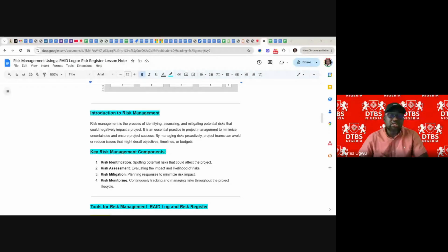As you're having contingency for budget, you're equally having contingency for timeline. If you have 6 months to deliver a project, you can plan the project around 4 months, so you build a very tight corner. But if you slip from 4 months, you fall back on 5 months. If you slip again, you fall back on 6 months.